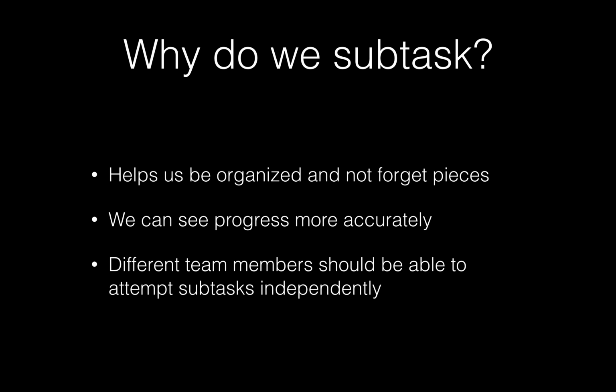So what ends up happening is a subtask should be an independent task. So it should be such that I can work on it without affecting someone else. So for example, email would be a subtask. REST API would be another subtask. But we have to make sure that the subtasks are independent tasks that won't interfere with each other's work. And generally, a design would be another subtask similarly. But you want to make sure you're both not designing the screen. So what you might do is subtask and say someone's going to design the left bar and someone's going to design the right bar, so that at least when they're working, they're not interfering with each other.